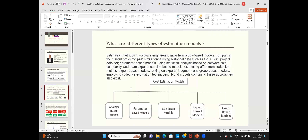What are the different types of estimation models? Estimation methods in software engineering include analogy-based models, where you compare one project to another using parameters like complexity, skill level, size, and development platform. This is done using historical data available with the ISBSG, and it can also be done using statistical analysis based on your context-sensitive data from your current project and organization, using simple regression.